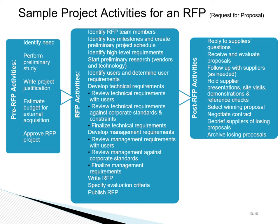When we identify a resource or product we need, we would typically put a request for proposal — or RFP — together. This slide shows the list of activities for an RFP. One of the key activities that need to be included in an RFP is the evaluation criteria by which we will select the winning contractor. These criteria need to be part of the RFP and sent to the contractors so they can ensure they satisfy those criteria.